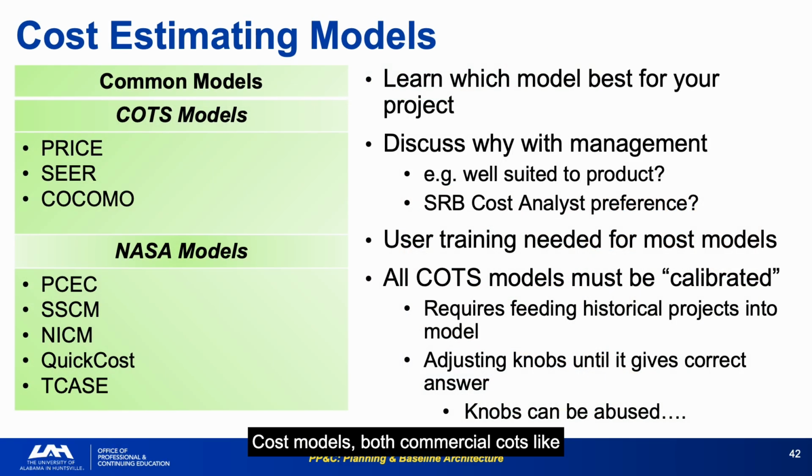Cost models, both commercial COTS, like Price, SEER, and CACAMO, and NASA-specific like PCC, SSCM, and CM, are the tools that implement the parametric estimating methodology. Models can be made to tell you whatever you want to hear. Adjusting knobs until the model produces the right answer is how optimism gets embedded in estimates that later justify overruns.